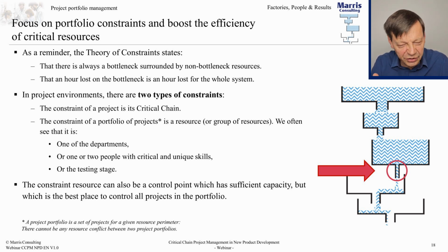In any portfolio, the projects will end up piled up and blocked by the bottleneck, right? So you go through your system and you count how many projects are at that stage, how many projects are at that stage. And when you find one where there's a huge queue and just after it there's a lot less, you've found your bottleneck, okay? Typically we find 1/3 of the portfolio is sitting in front of the bottleneck, okay? So finding a bottleneck is quite simple.